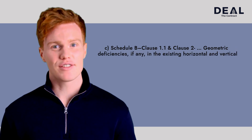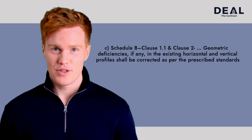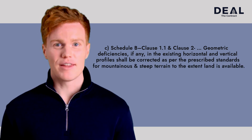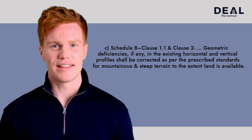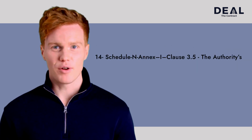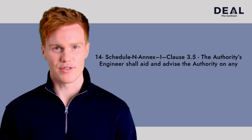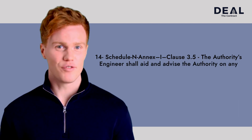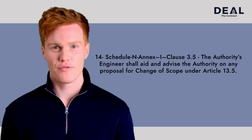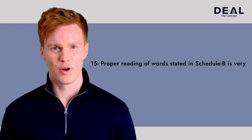Geometric deficiencies, if any, in the existing horizontal and vertical profiles shall be corrected as per the prescribed standards for mountainous and steep terrain, to the extent land is available. Schedule NNX, Clause 3.5 states that the authority's engineer shall aid and advise the authority on any proposal for change of scope under Article 13.5.